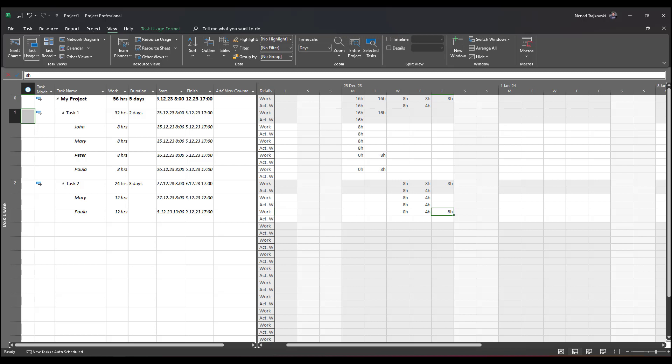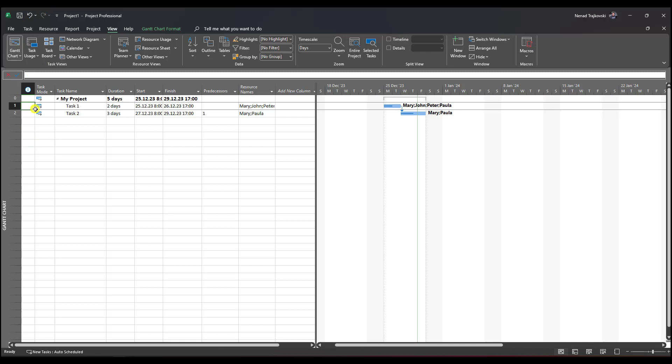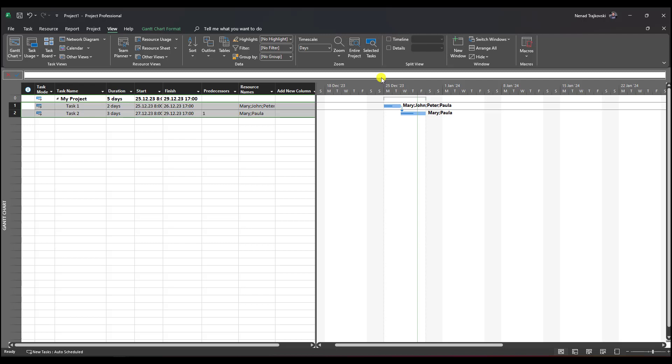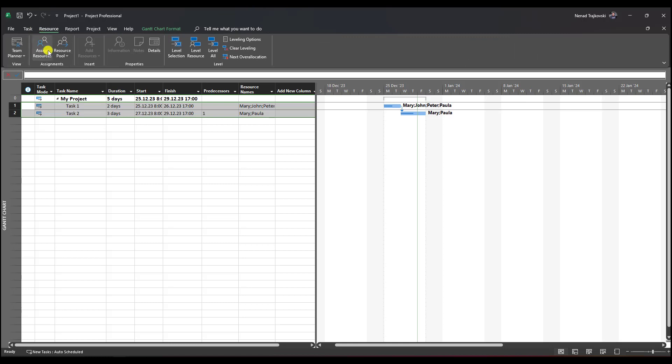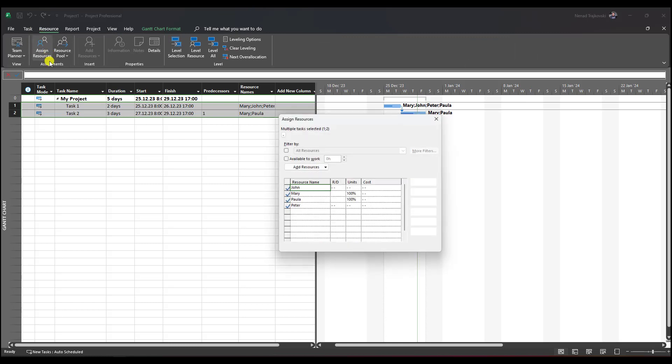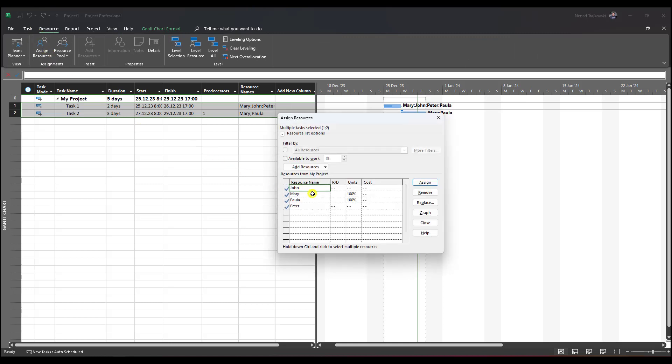Let me go back here. What you should do is select the tasks for which you want to replace resources, go to the Resource tab, Assign Resources, choose the resource you want to replace, choose Replace, and then choose the person who is going to replace the resource originally assigned to the task.